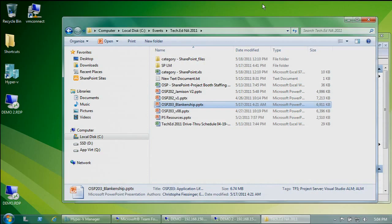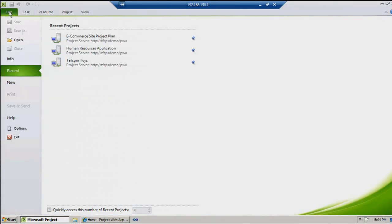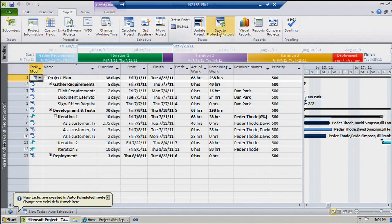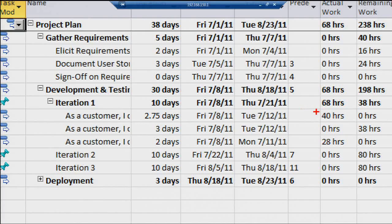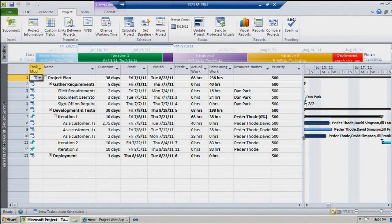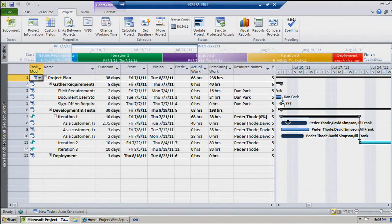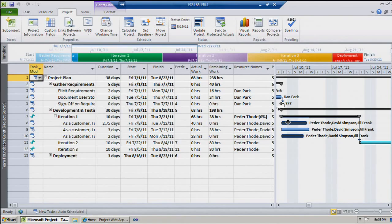A week later, Lena the project manager reopens the plan. You can see actual work went up — now 40 hours for the first story and 28 for the second. The third still has remaining work. You can also see progress on the Gantt view: a black strike on the Gantt chart represents time-phased actual work coming from the system. In summary, what you saw in this first demo: an Agile development team providing visibility to the PMO without leaving their tool of choice — whether Excel or Visual Studio.